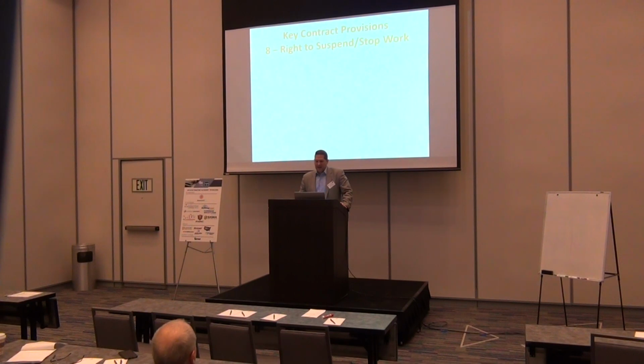All right, another thing, and I think this is an important thing to try to make sure that you have in every contract, is something that says specifically that you have the right to suspend or stop work, usually for non-payment, but it could be for any kind of breach. It's surprising how many standard form contracts don't have this. It's kind of just assumed that you're going to get paid, and this doesn't mean that if you have a dispute over a change order that you can just stop work and walk away from it. That's not what that means.